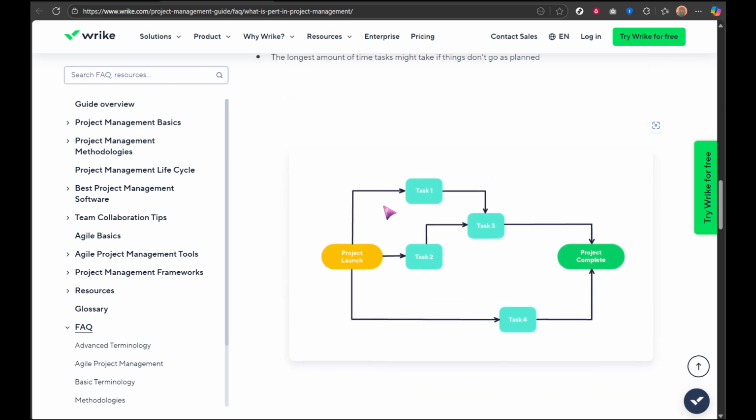We move on to calculating the expected durations for each task. For each one, estimate 3 timeframes: the optimistic, which is your best case scenario, the average, which is the most likely duration, and the pessimistic for the worst case scenario. With these estimates in mind, apply the PERT formula to calculate the expected duration.